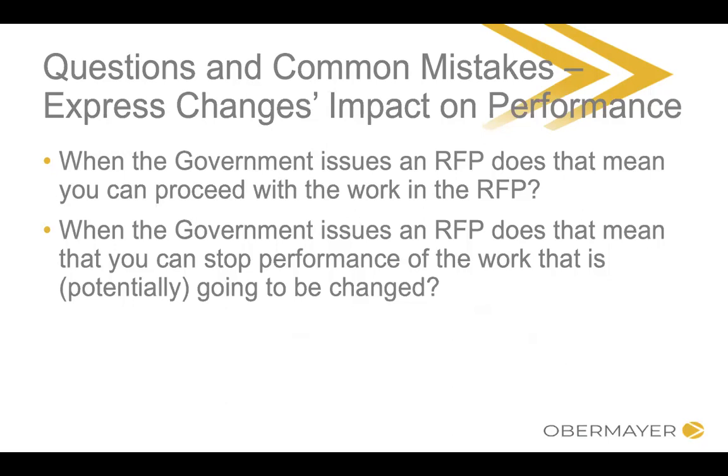When the government issues an RFP, are you supposed to proceed with that work? Are you supposed to start building up that 2nd story? No. Again, remember, the RFP is just the government's idea of being like, hey, we need to suss out what it would cost and how long it would take. And if we feel like actually making this change, we're just kind of thinking about it. We're browsing right now. We're not ready to buy. So no, your contract remains what your contract was, unless and until there's actually a change made to the contract. So an RFP is not a change yet. So you don't want to assume that that's been incorporated into your contract. You want to wait for the actual modification.